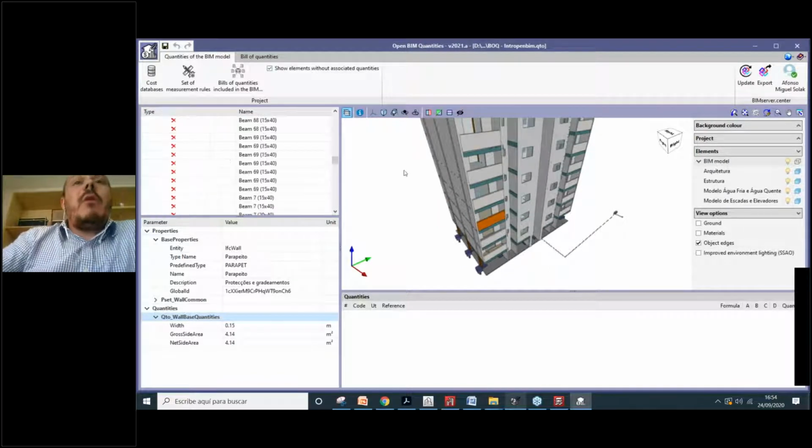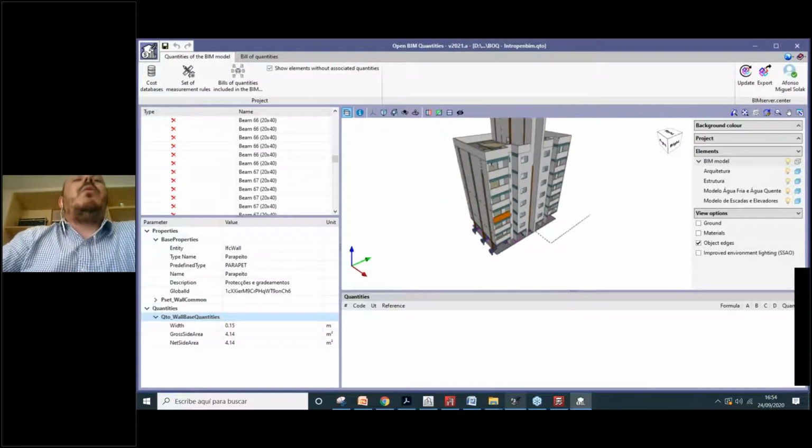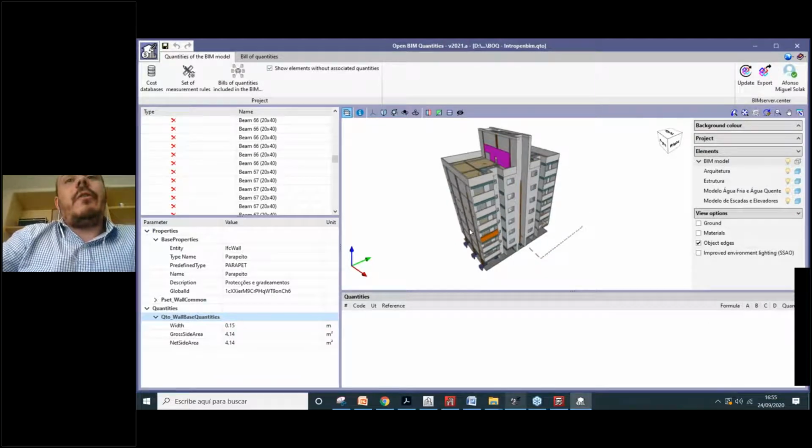For each element that we have on our model, in our BIM model, we will associate an economic information, an information that is associated to our budget that could come from a cost database. So to do that, we must have three main things. First, the quantities that come from our BIM model. This information we have, and we added this information when we imported the model from BIMserver.center.